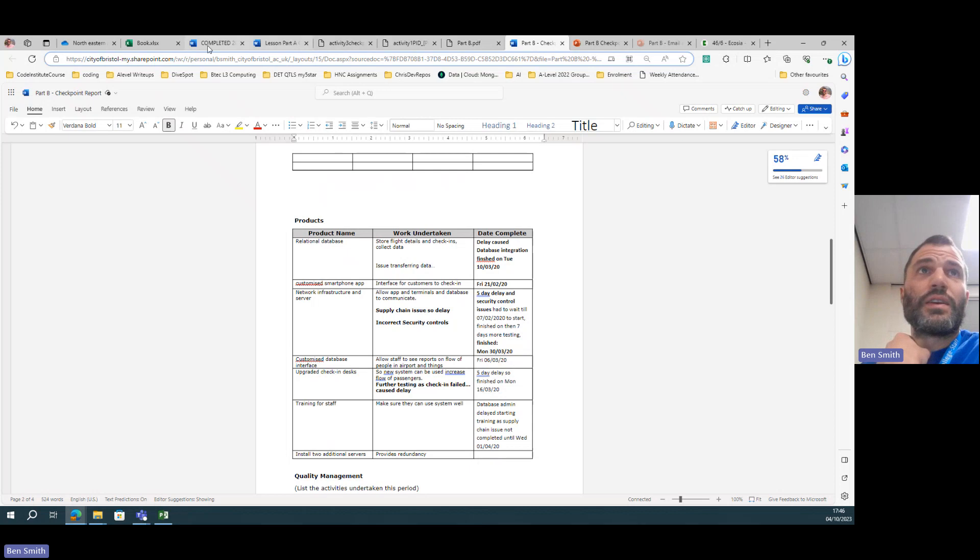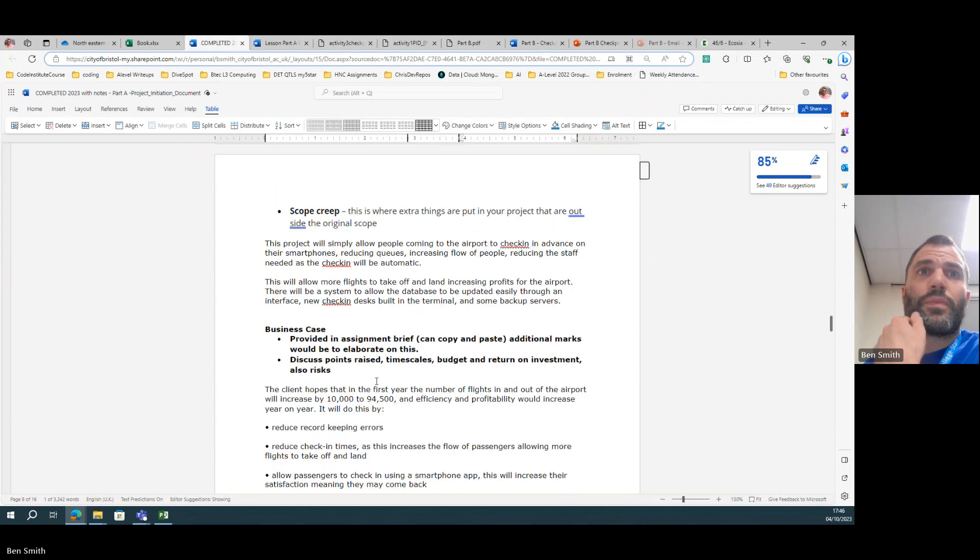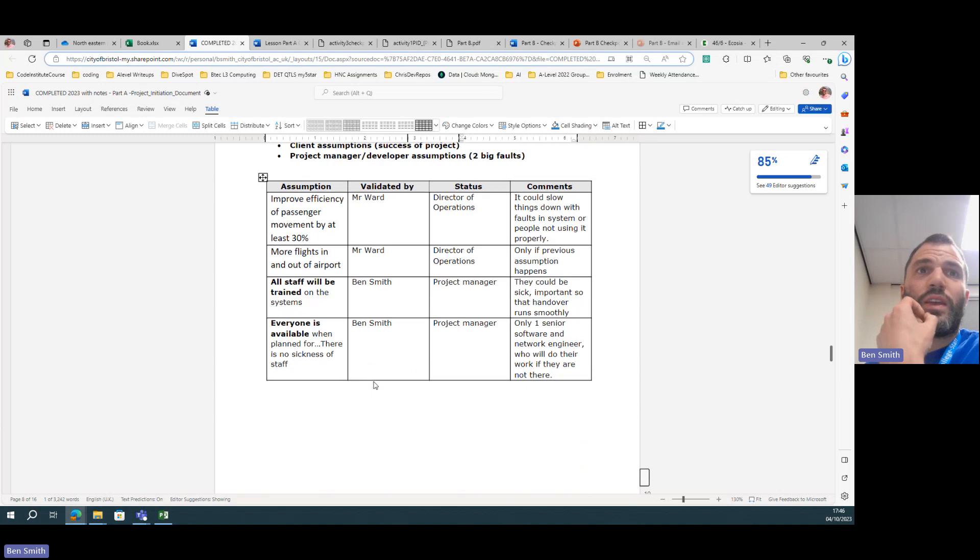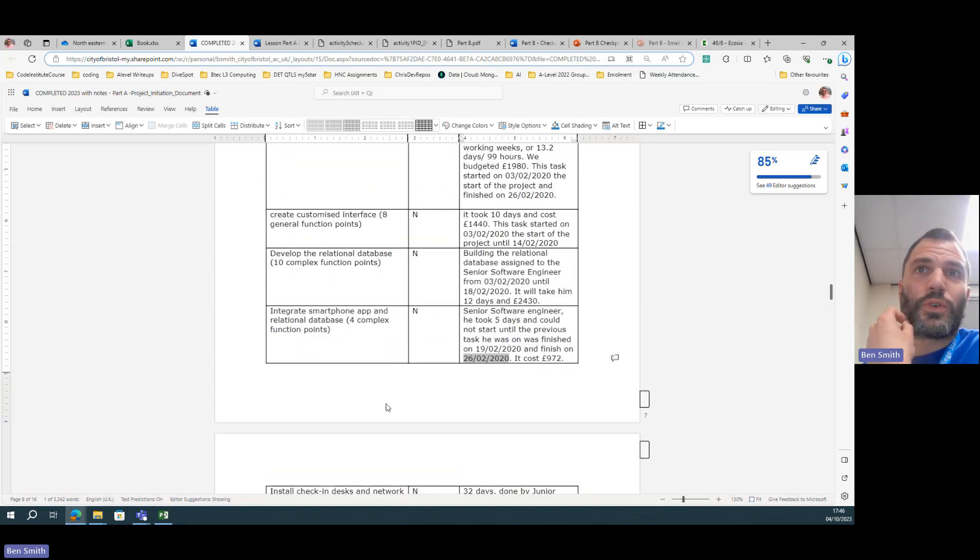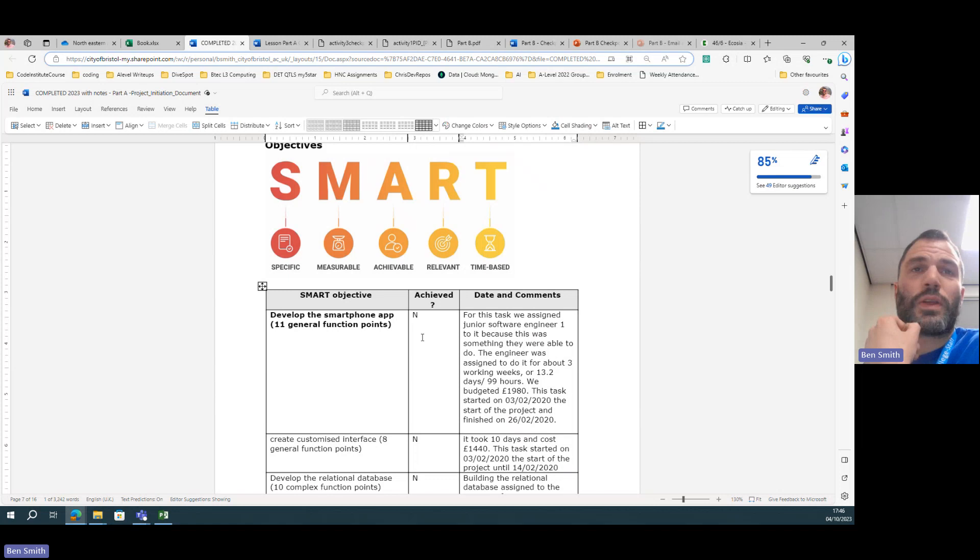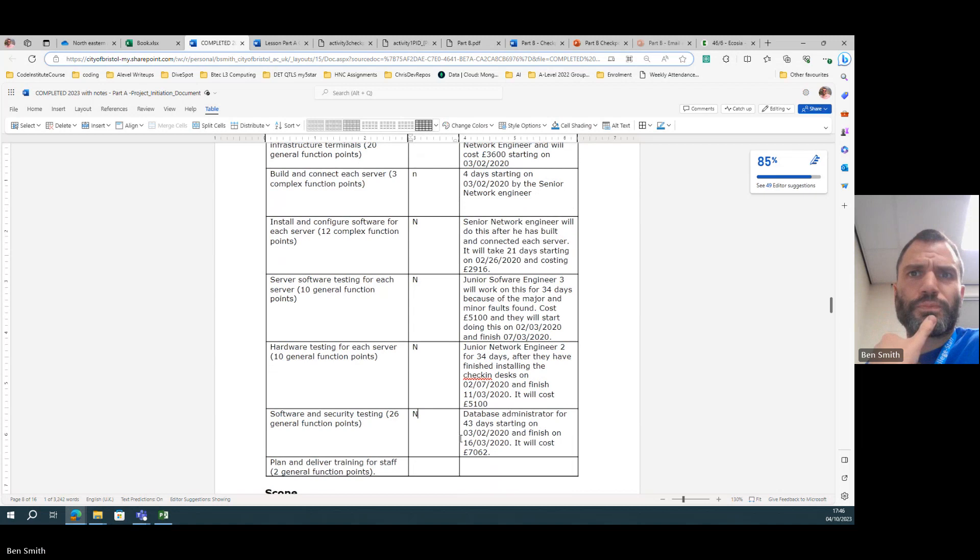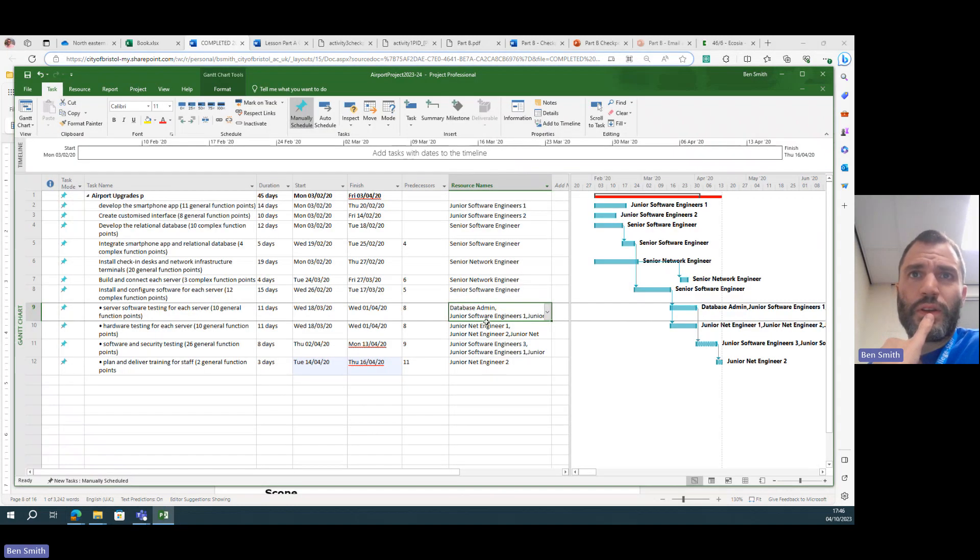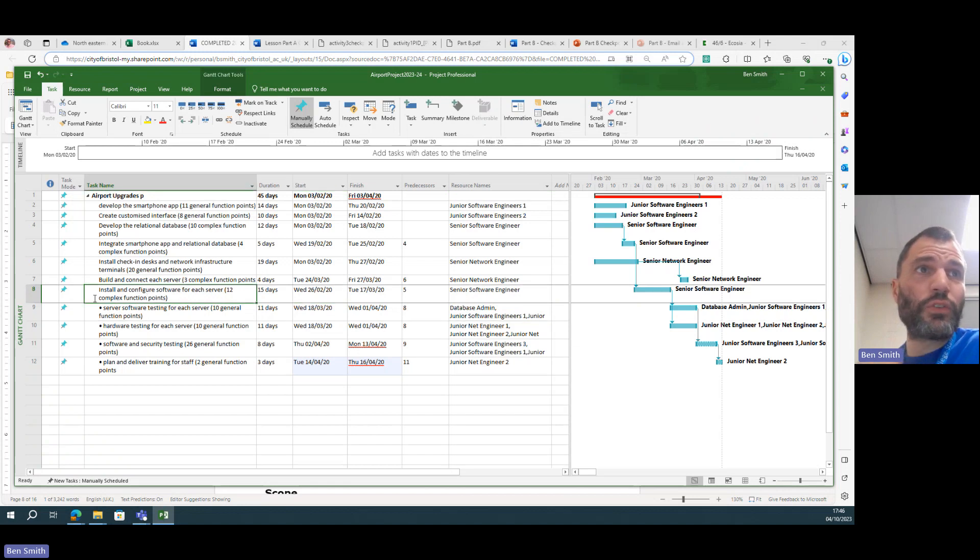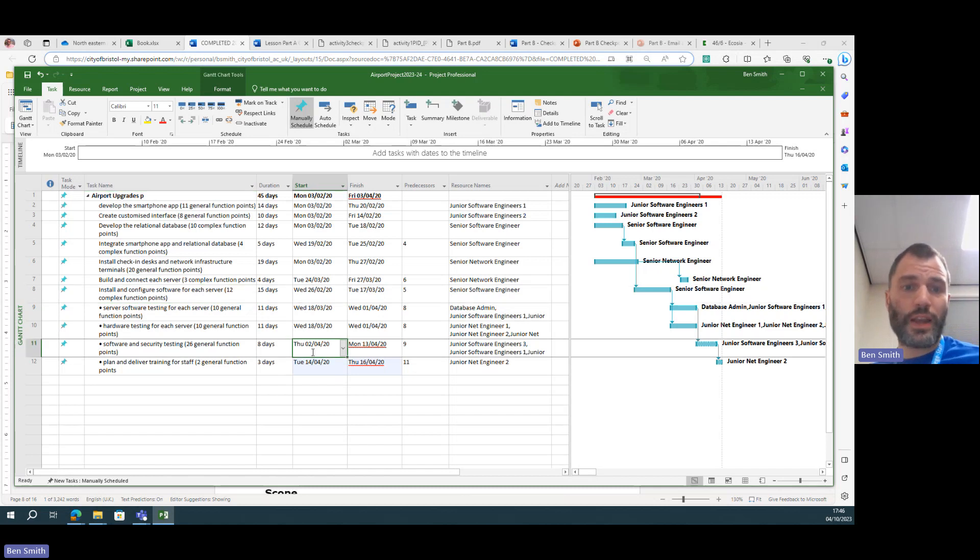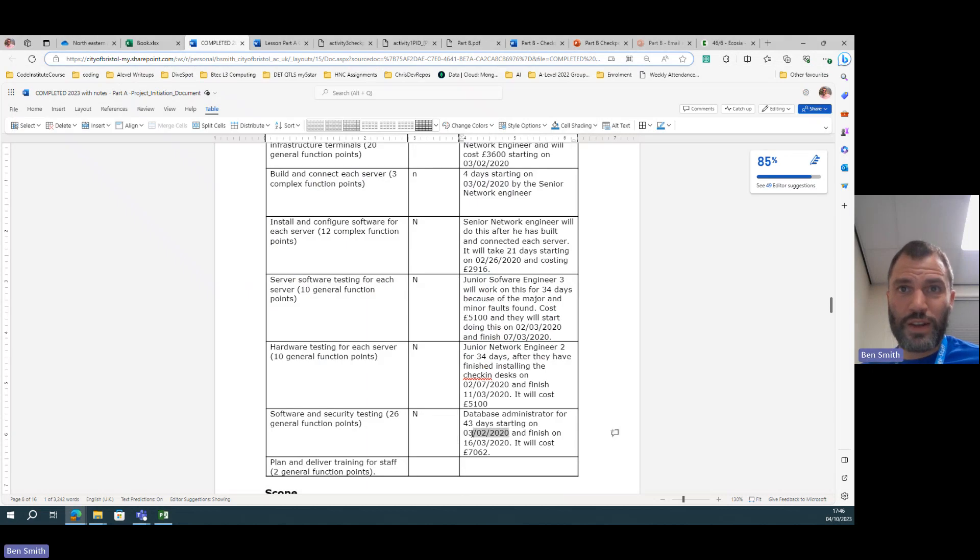So when you're talking about in your SMART targets, for example, and you say, oh you know, these developing the, you know, software and security testing no longer takes—we don't have to start it from the start of the project but we're going to start it from when it makes sense to start it from, i.e. after we finish installing and configuring the software for each server. All these testing tasks will take place, so we're going to start it then. So I'll paste that in there, look at that.